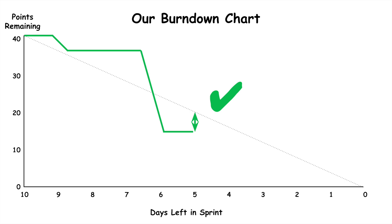Here's another example. As before, the team signed up to complete 40 points in a two-week sprint. At the end of the first week, the team has completed 25 points. This would suggest that the team is on track to meet their sprint goal.